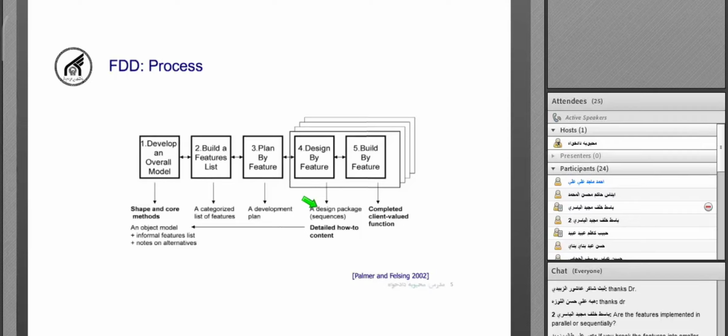Mr. Zobaid, if we have a big feature, for example one that will take 4 weeks, then we should break that feature into 2 smaller features that each take 2 weeks. Only that big feature needs to be broken into 2 or 3 smaller features. Then each one of those small features can be implemented in less than 2 weeks. Okay, is it clear, Mr. Zobaid?